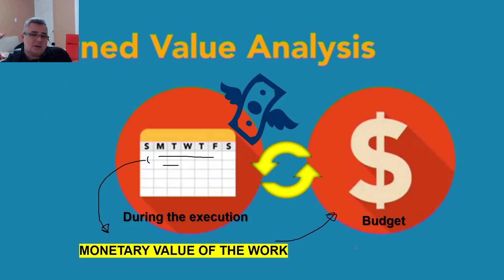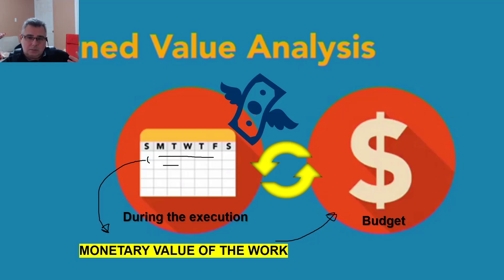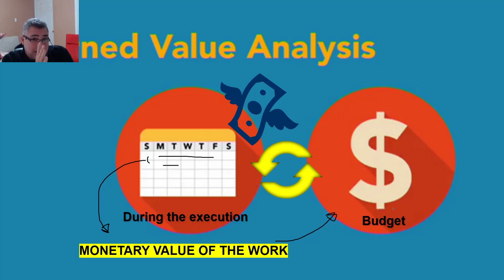That's the idea of the earned value system — during execution we analyze the work done, understand the expenses, compare them to your budget to see if you'll be able to finish the project within budget. Sometimes you can, sometimes you can't. If in the middle of the project you realize you don't have enough money to finish, that's when you start issuing change requests and asking for more money. The amount of money you are using must be aligned with your budget.